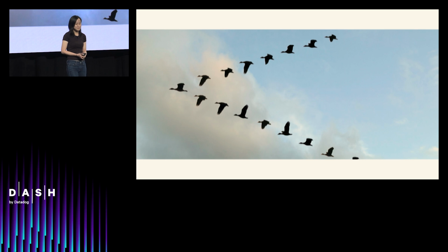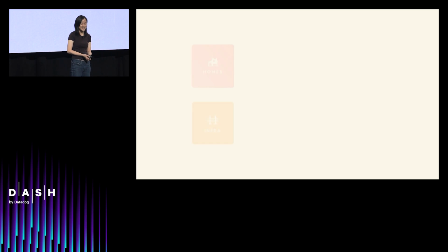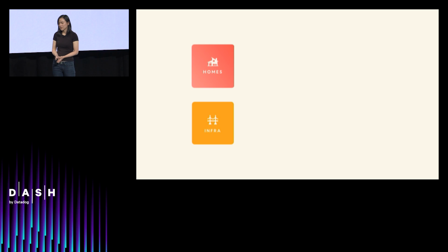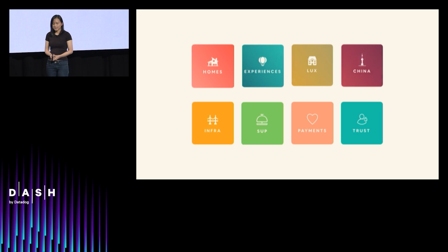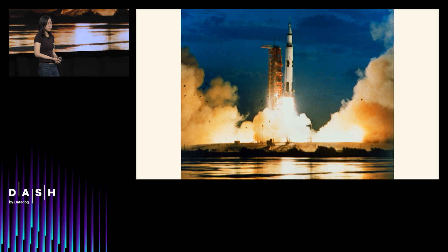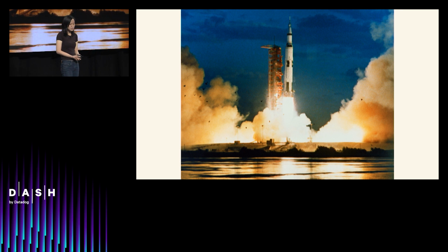And so we had to go on roadshows. Starting from the first flow in the homes product, we worked with the homes product teams and got commitment to move all of homes product flows to SOA. And then talking to all the enabling organizations across Airbnb, customer support products, trust, and payments, they were also committed to moving to services. And then establishing headcount and resourcing across all the remaining products at Airbnb. So that's great. We've got everybody committing engineers to this migration.